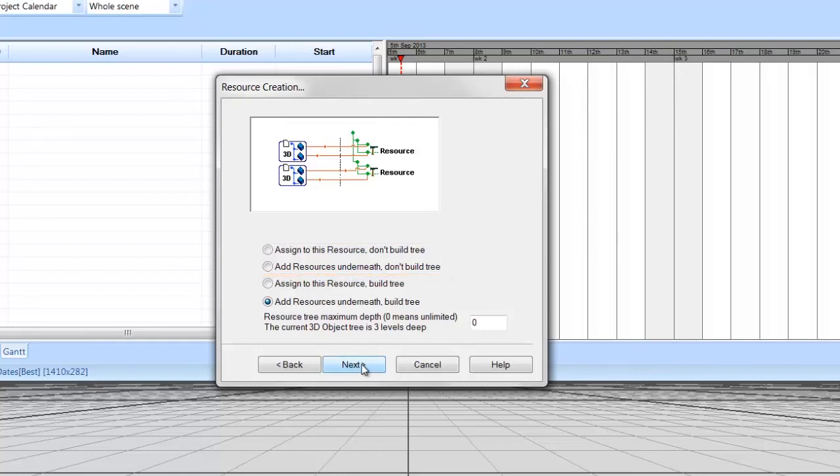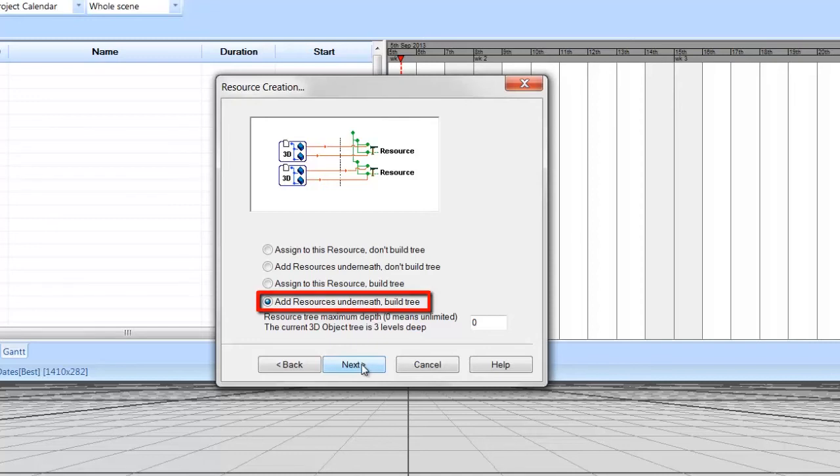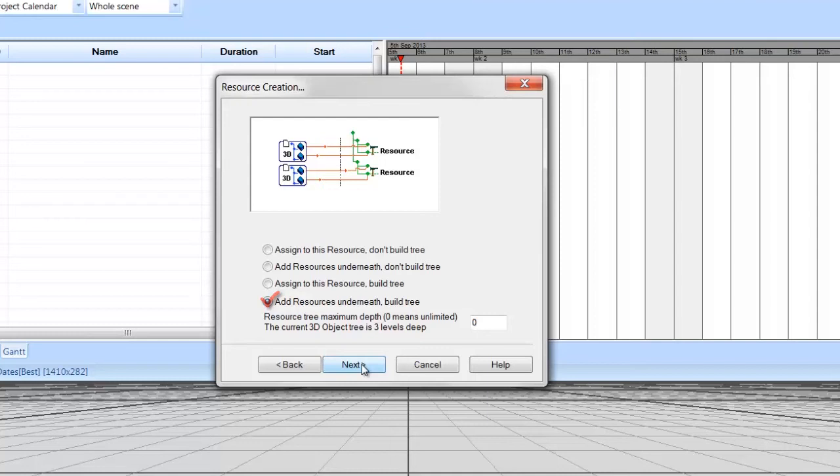The bottom option, Add Resources Underneath Build Tree, gives you the largest object tree and the most options for filtering and linking resources to tasks. For this tutorial, we will give each individual item a resource, so choose Add Resources Underneath Build Tree and select Next.